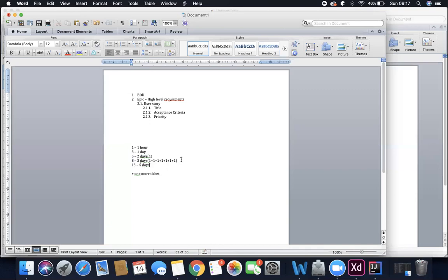Okay. I think this 8 is a very good answer because 1.5 days development, half a day for automation, working on the automation and developing the code, and you also got 1 more day. So half a day you will also work with the developer and make sure it's all good, then the final half day will be executing the tests, and if something fails because of a locator and all, you'll still go and fix it. So 3 days is a good answer. Okay, makes sense.